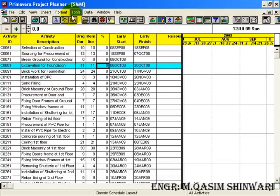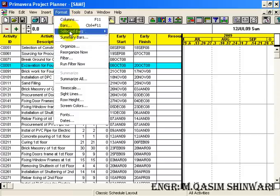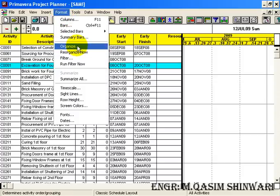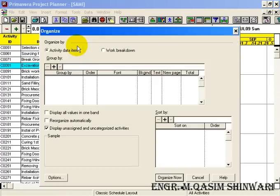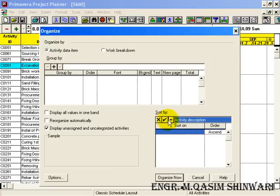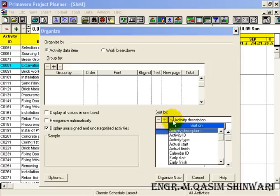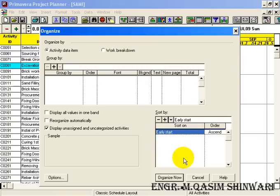OK, now let me do sorting. Sorting can be done similarly by going to Format, Organize. And here, Sort By, Add, and sort by Early Start, and leave it as ascending.